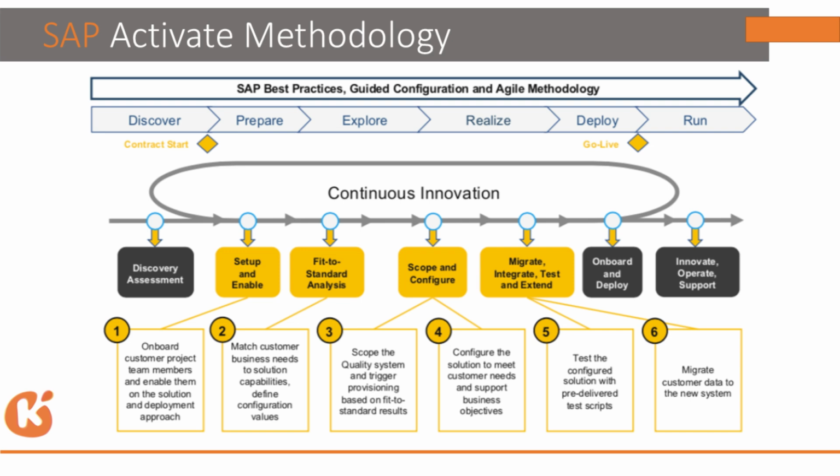That is called cutover activity. So during the cutover activity, we need to have many things. Background jobs are scheduling properly, all payroll areas are updated, posting periods are open, and wage types, whatever the client has given, are all existing. Options type and all actions like hiring, termination, transfer, data change are all updated in the system. Everything we need to take care of. So once everything is finalized, then we can go for go live.